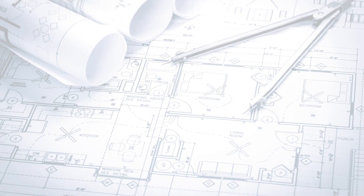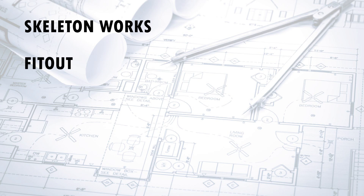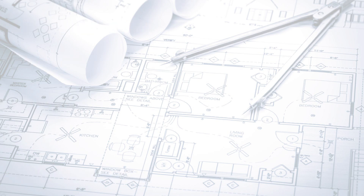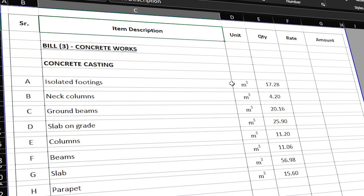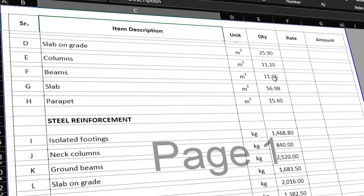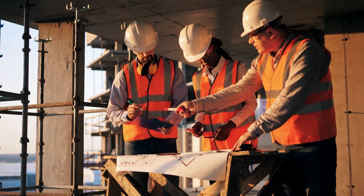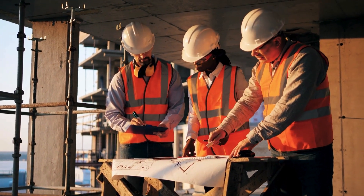Are you going to do structure only, or the skeleton? Are you going to do fit-out as well? Maybe envelope, MEP, or external works? You need to know exactly what you are estimating the cost for, and you need to find these items and list them in what we call a BOQ. Sometimes the BOQ is provided with the tender documents; other times it is not, and you will have to create your own BOQ. It's very important to define your scope of work, understand what you are required to do, and have a proper BOQ with all the items and their units of measurement.